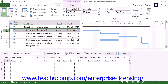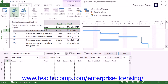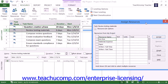You can create resource assignments for selected tasks within the Assign Resources dialog box in Microsoft Project. To do this, select the task in the project file to which you want to assign resources, and then either click the Assign Resources button in the Assignments button group on the Resource tab within the ribbon, or press Alt+F10 on your keyboard. Next, select the name of the work resource you wish to assign to the selected task from the list shown in the Assign Resources dialog box.